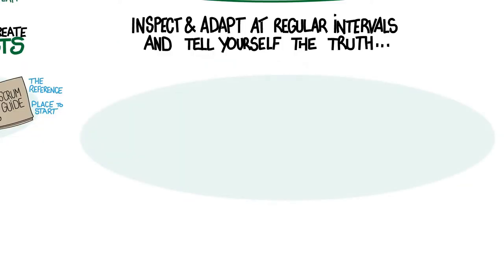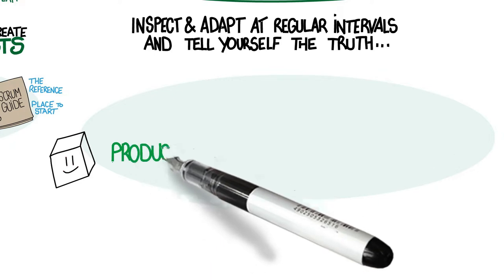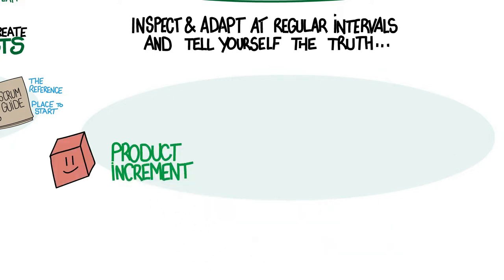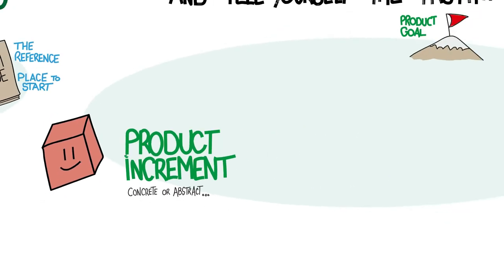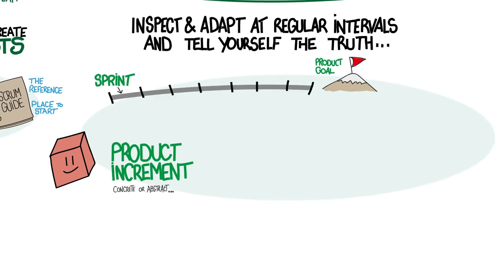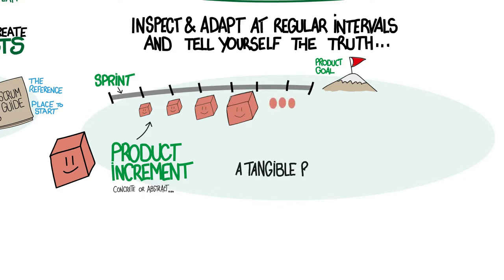Scrum was modeled on patterns of successful product development. The product might be something you put in a box, but it could also be something more abstract like a new store location or a process improvement for your company. Scrum works in short iterations called sprints. At least once per sprint the scrum team produces a new version of the product with a few new or upgraded elements. Scrum calls this the product increment.